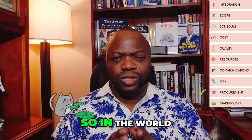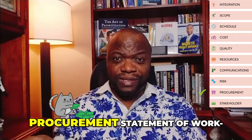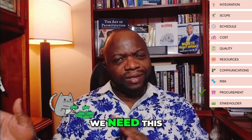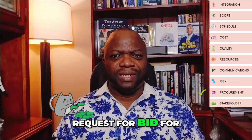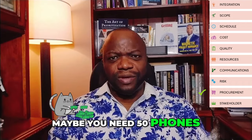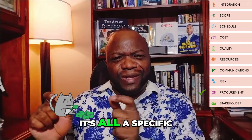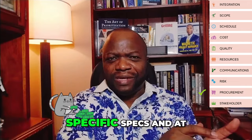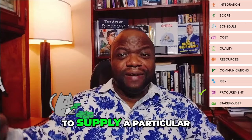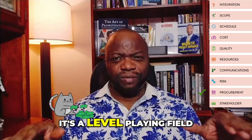It's all procurement. So in the world of procurement, it's all about writing out what needs to be done, a scope of work. We call it a procurement statement of work. Putting that into a request for proposal, which is a document that says, hey, we need this, can you do it? Or maybe it's a request for bid for some very simple items that are very easy to understand, maybe phones, maybe you need 50 phones. Well, you could just put out a request for bids because it's going to be apples to apples. It's all a specific type of phone with specific specs, and at the end of the day, whoever is supplying that is going to have to supply a particular brand of phone that meets those specs. So we use a request for bid when it's a level playing field.